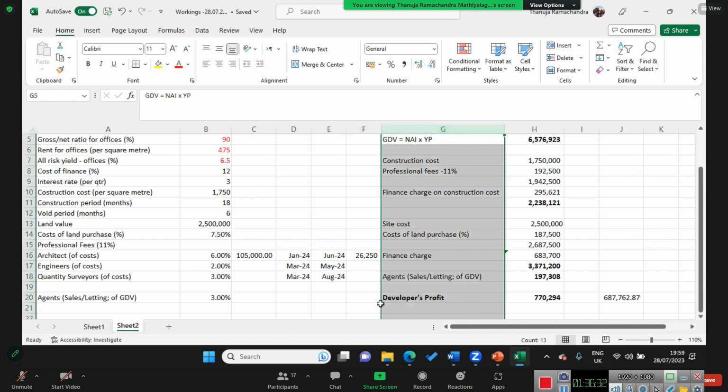So therefore, if we take the number of months, like 6 months, the rest of the 5 months can be equally divided, and you will be paying architects accordingly. So for this amount, we need to calculate the interest for a certain number of months, and the remaining one may be a shorter period than this one, because not everything needs to be borrowed at the same point in time. Isn't it?